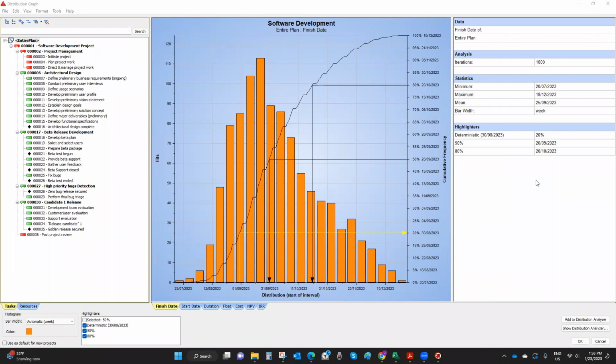Professor, I have one last question. Absolutely. While you're uploading that, I noticed that there was a remaining duration. It should be like a total duration for the task, right? The remaining duration, I'm just confused there. Okay. The remaining duration is a language used in Primavera. Now, remaining duration could mean the entire estimate if the task hasn't started yet. Or it could be remaining duration because we started to work on this task. There are 5 days left to work on it.